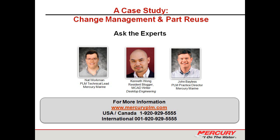I think there's an interesting relationship between that question and the previous question. We have a large assembly management strategy where the engineering bill of materials is structured in a similar way for every project. So we can take an engineering bill of material from a previous project and start from there when we get the team formed for the new project. And because we start with the old bill, it highlights where you might want to look for common parts from a previous product. Yeah, and that large assembly management philosophy works extremely well for downstream users because from project to project, they'll know where to look for things. And that's been very helpful for creating other systems based on the bill of material.